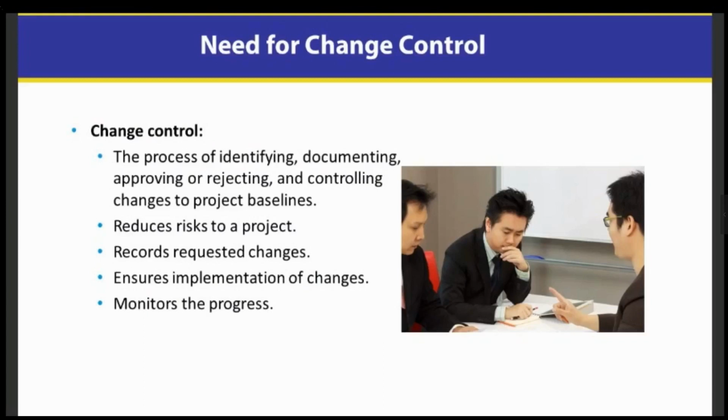That's right. Exactly. And then it also monitors the progress. This is where we started. These are the changes we accepted. This is the scope change, but it's been accepted, and we can see our end product versus where we started. So if we agreed to make a change, then part of the final project deliverables needs to include that change. That's right, and we also need to recognize that we did make that change versus what we originally set out to do in order to justify the time and the cost changes that were done as well.